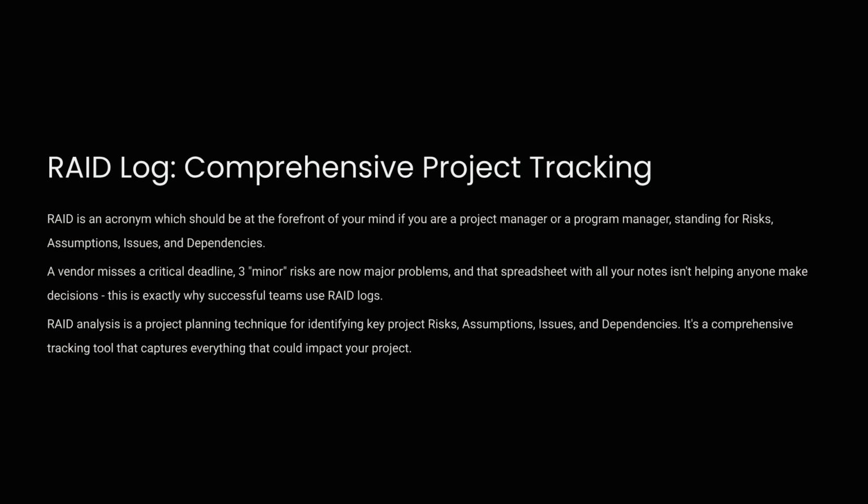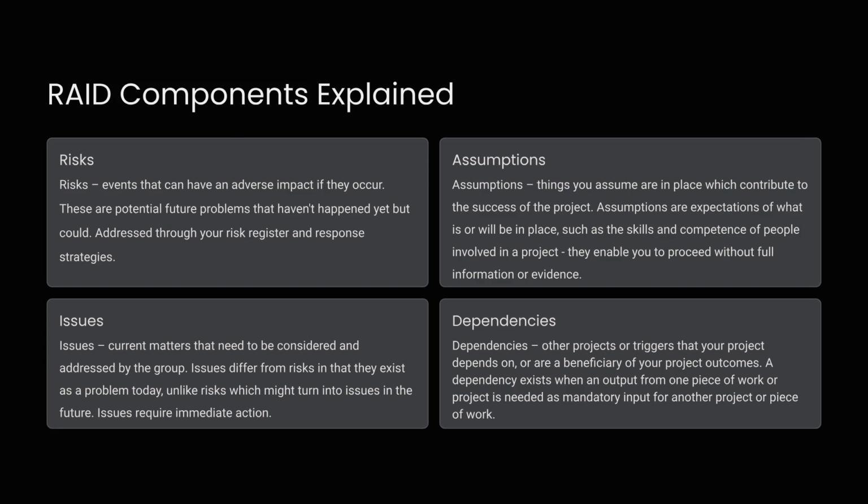The RAID log is a comprehensive tracking tool that captures everything that could impact your project. RAID stands for risks, assumptions, issues, and dependencies, helping successful teams manage potential problems. Risks are potential future problems. Assumptions are things you expect to be true, enabling you to proceed.